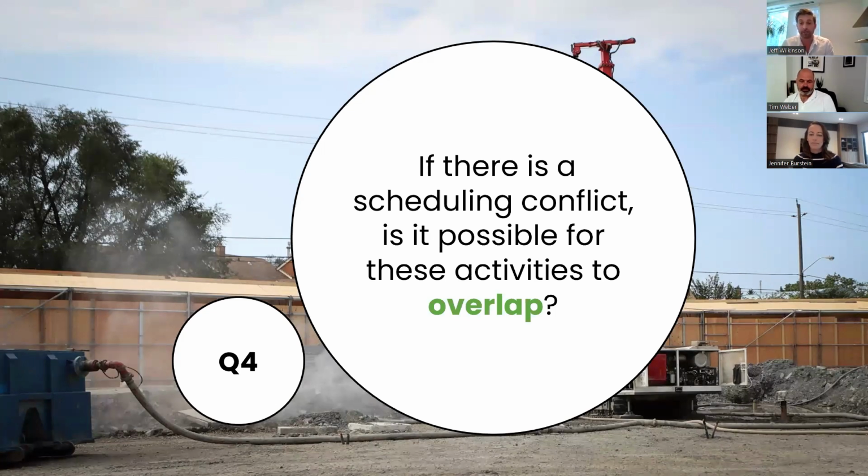so much on the site and the actual design of that site. So yes, we have done it together, Tim. We've overlapped activities at the bore field stage and the lateral stage. But I think it could have been planned out better when we're doing that overlap, and had more conversations, probably pre-meetings with trades on how that overlap is going to work.